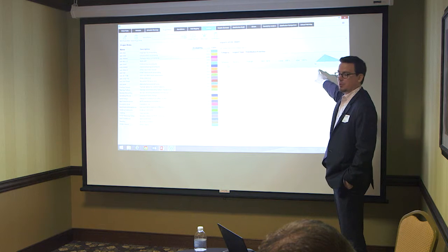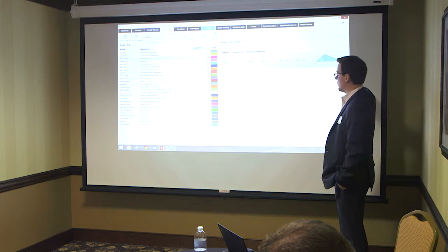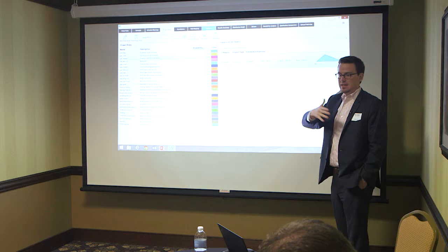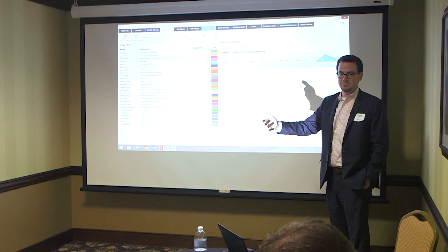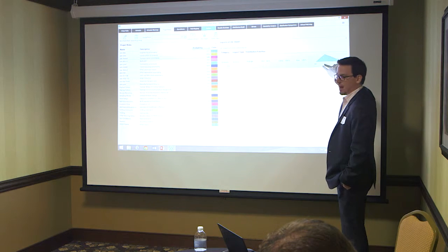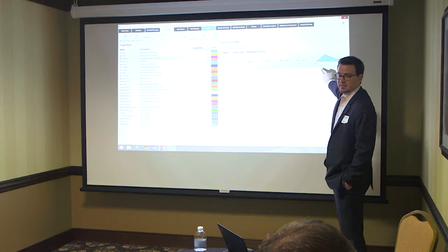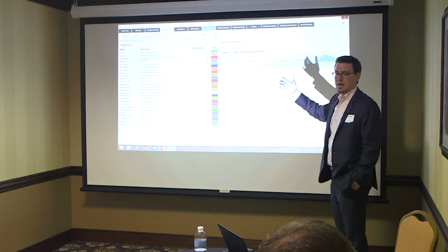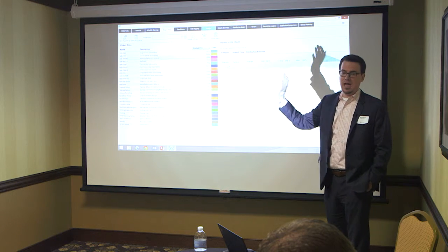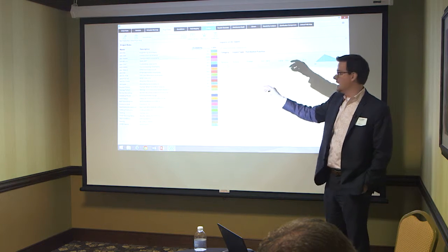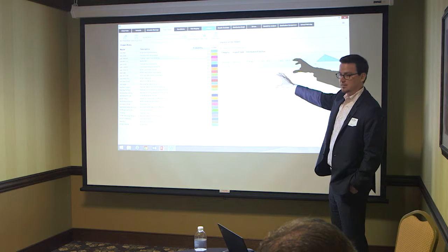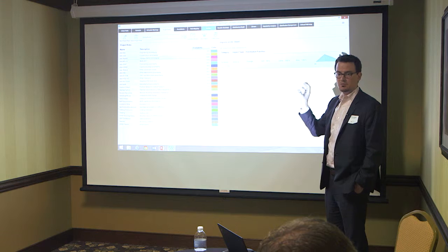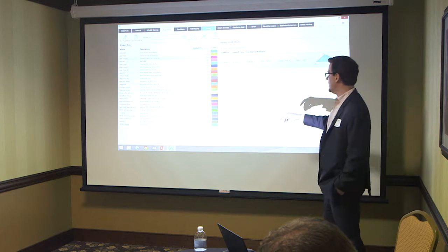At 90%, I'm going to scale back my duration by 10%, or I'm going to scale it up 20% during the analysis. I've inherently captured that spread, and I can capture opportunities that way. I don't have to have a positive greater than 100%. I could have this scale back at 40 to 100%. I could say what's actually in my schedule is my max. I'm going to scale it back and say I could cut half that duration off. So having that relative impact type gives me ultimate flexibility in how to manipulate that duration to represent the risk or the opportunity I want to capture.